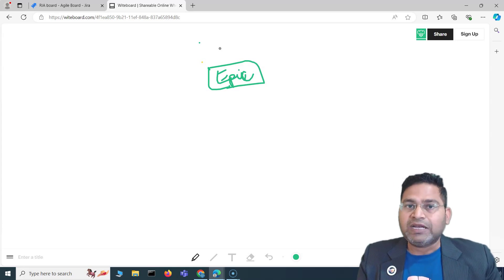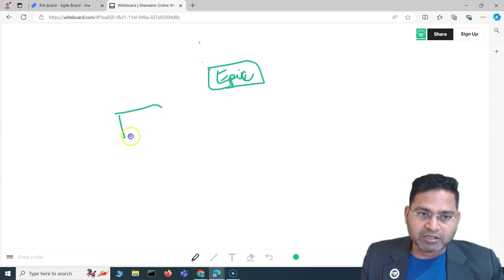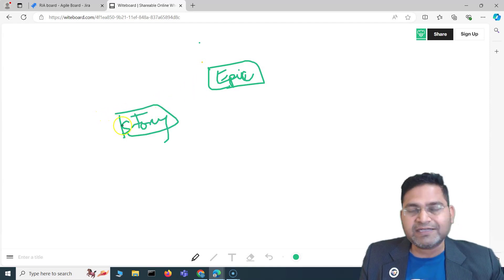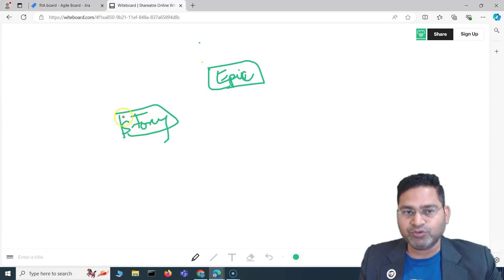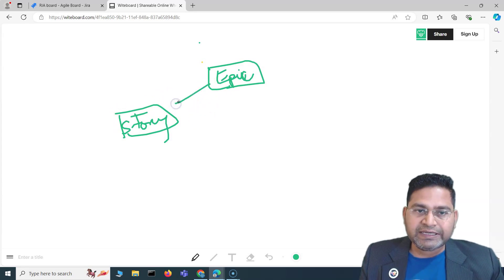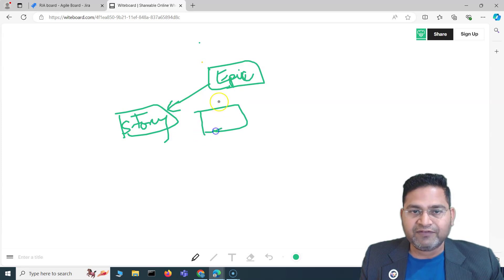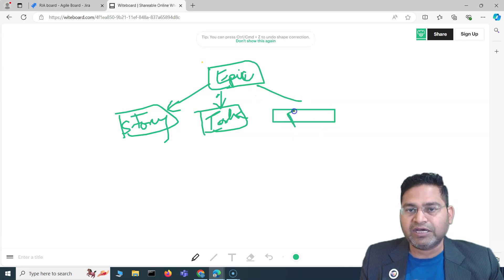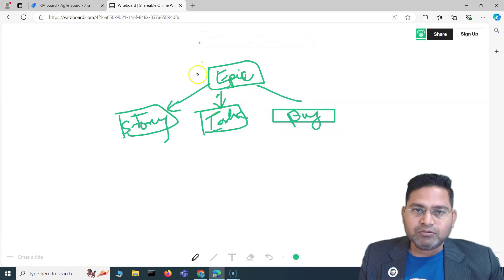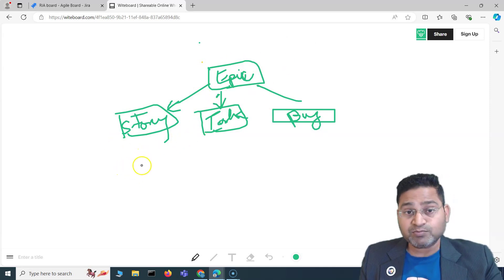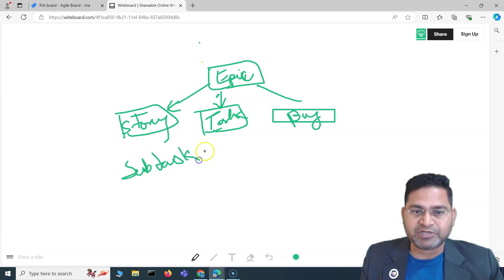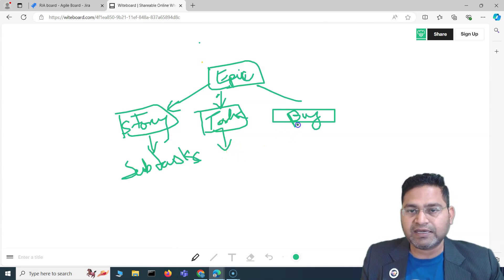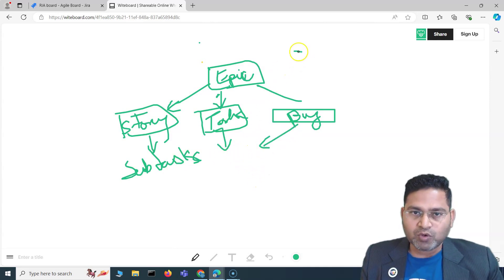Within an epic you will have different stories. A user story is a work item described from the end user's perspective. A story can be a child of an epic. Then you have tasks, which can also be a child of an epic, and then you have bugs. That's basically how the basic structuring works. You also have subtasks — every story, task, or bug can have subtasks within it.